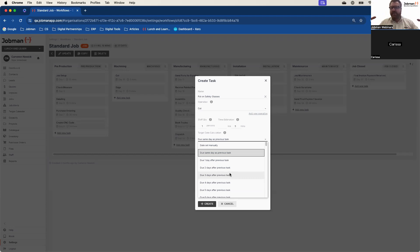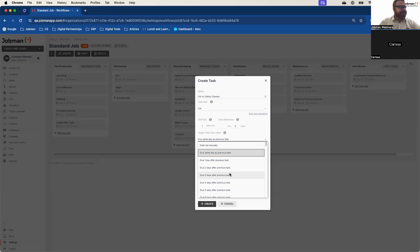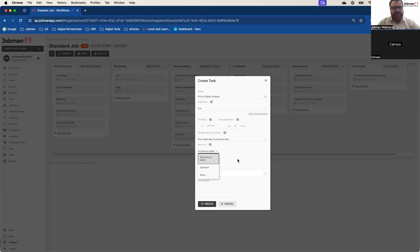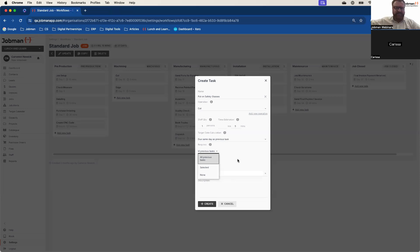This is how we build that nice estimated flow. It's important to note that if tasks are being completed faster than your standardised workflow, they will still appear on the agenda screens — so people can work faster than your flow. These lag times are there just to allow enough time to make sure processes are handled in a standardised format. The 'requires by' setting — we're going to set that to 'all previous tasks' — is the way we tell the software how to manage this flow correctly. For 99% of your tasks you can just leave this at the default: all previous tasks. I need you to detail before I can purchase order, before I can cut, before I can assemble, before I can quality check, before I can dispatch, before I can install.